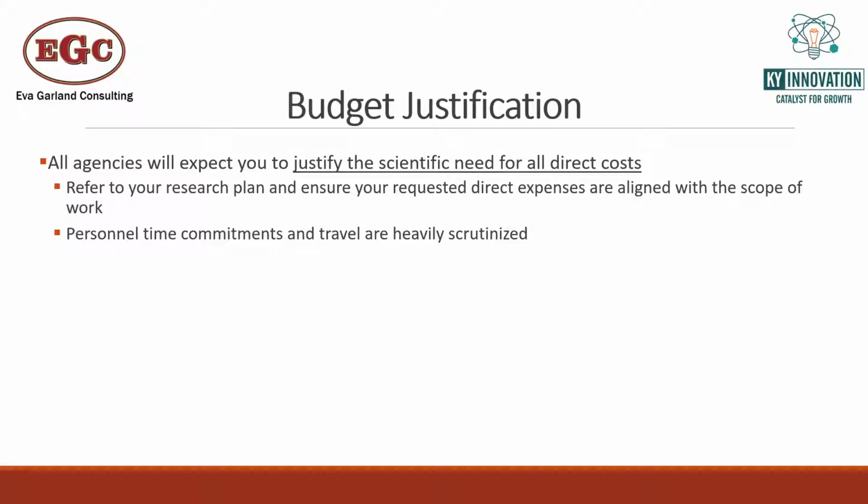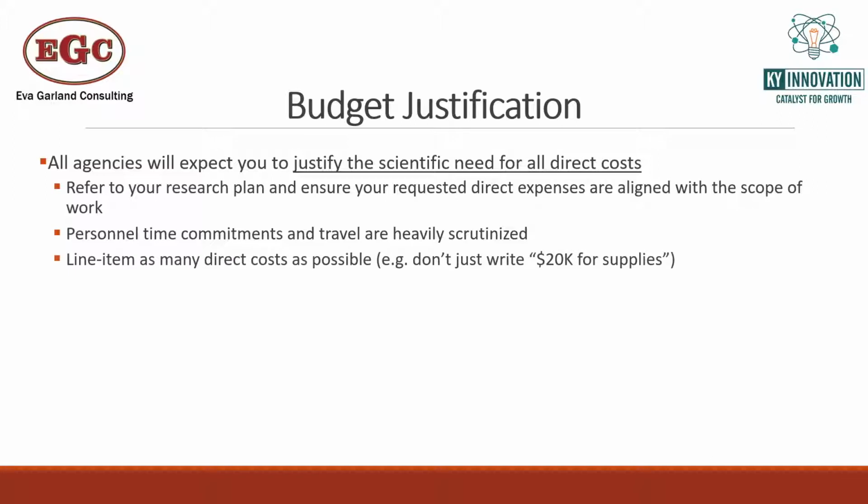So when you do have travel, I would typically use it for instances where you need to meet and discuss the project progress. If you've got a subawardee or a contractor who's out of town and you need to travel to discuss the project with that individual, that's usually the best way to utilize the travel budget. I will mention that some agencies do have specific regulations. For example, NSF requires you to put in a travel budget to go to their annual conference, so pay attention to those things.